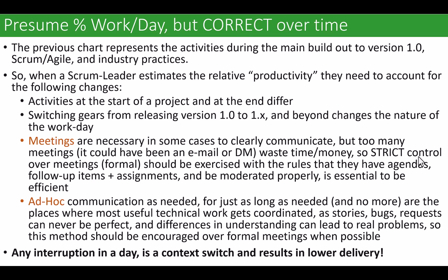And so it's very important that if you're going to do meetings, that you're just super strict about formalizing meeting structure. They need to start on time. They need to wind down before the end of the meeting period so that follow-up items and assignments can be done. There needs to be meeting notes generated after the meeting. And you need to say the word parking lot if you need to park something, and then you come back to the parking lot items at the end and you say, okay, we'll spin up a separate, smaller meeting for this or whatever.